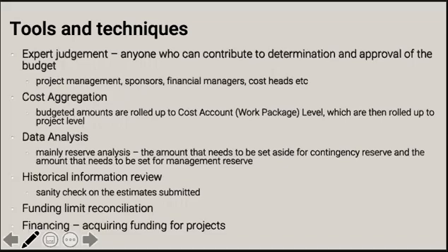Now, actually, worth mentioning that there mightn't be any management reserve at all. We're also going to carry out some historical information review, just to get some sanity about our cost estimates and the budget. So we're looking at historical projects and using them as benchmarks for validating the current estimates, so that we can assure ourselves that the budget that we have for this project is not totally out of control or out of ideas.